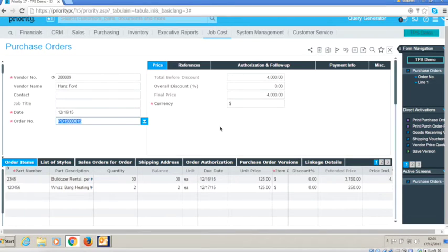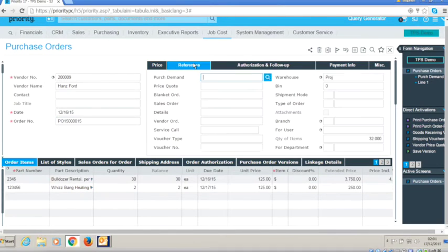Just to point out a couple of extra issues on the purchase order. I created the purchase order, I added an additional physical item to it. I also allocated the purchase order to a project-specific warehouse. This is typically the actual customer site where goods are going to be drop shipped to, but it doesn't have to be.